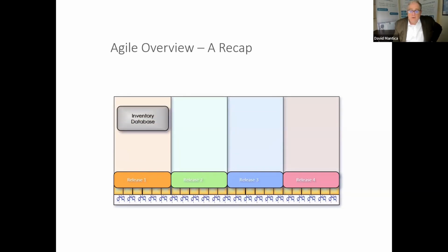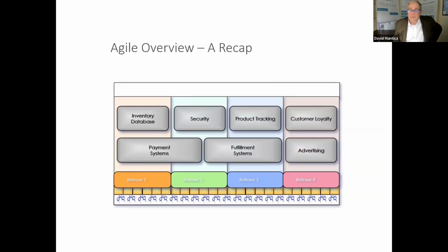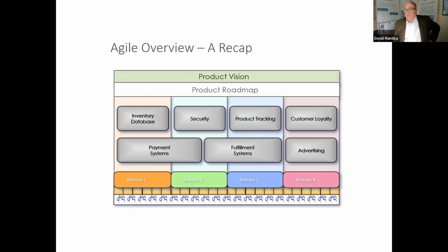And then you're going to have your overall delivery of different systems, your roadmap, and then finally your product vision. Your product vision might be, we are transitioning to a new type of toy, so it's going to affect all avenues of our production. Here's a production release roadmap, and ultimately we have to break that down into different releases to get those things moving. And then in that roadmap, you're going to prioritize which of these things are most important, where you want to start, and how you want to start. And those are your 5 levels of planning.